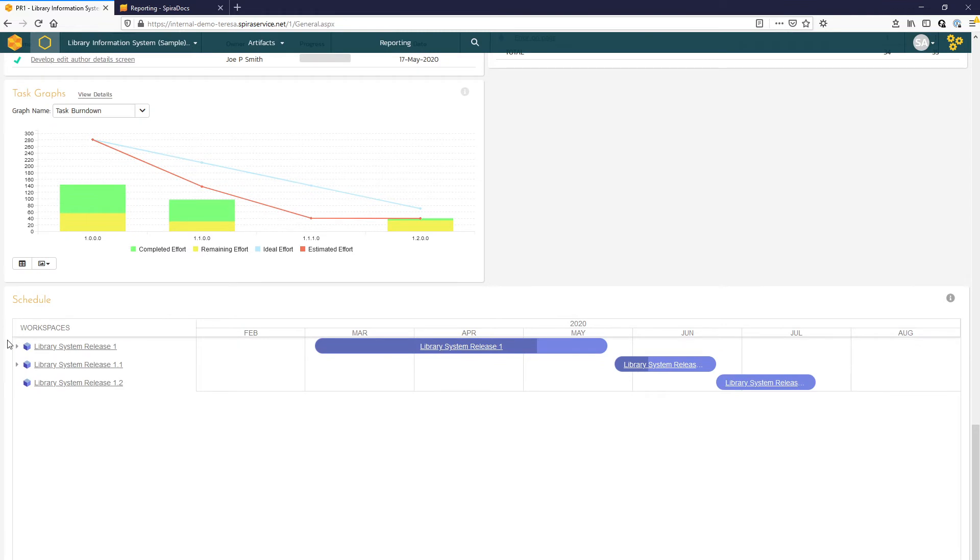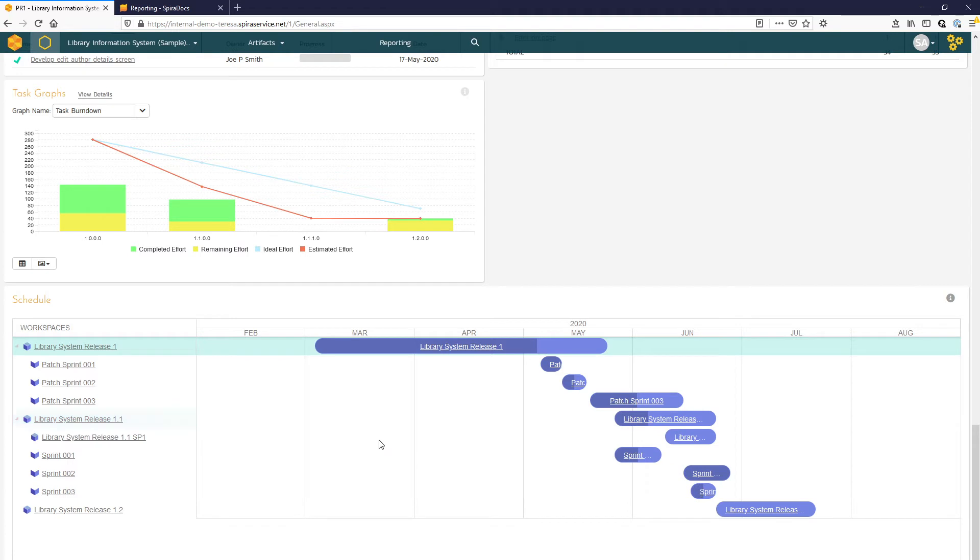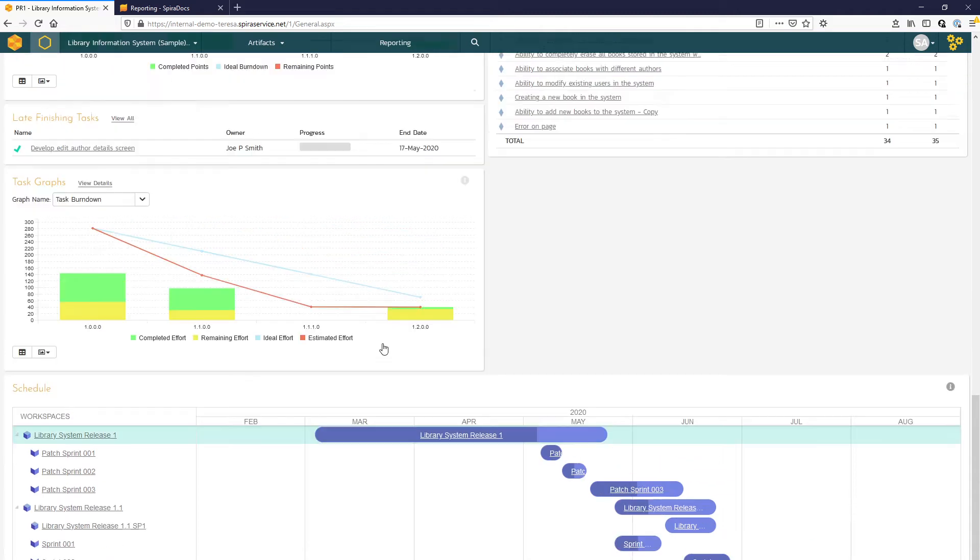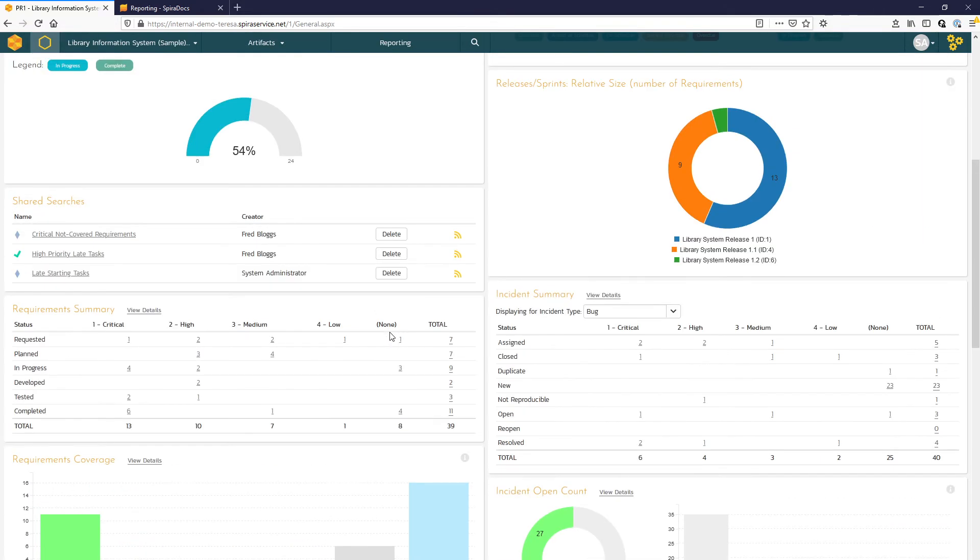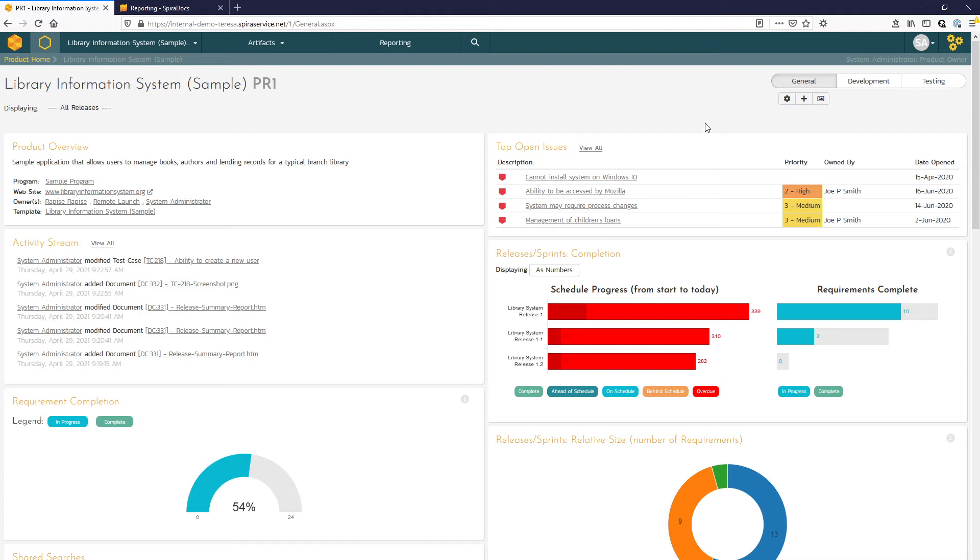And then down below you can see we have a Gantt view so you can look at the schedule for individual releases and sprints and we have that highlighted bar there to indicate the percent completion of those requirements. We can see the widgets that are included in the different views as well as where they appear on the page.